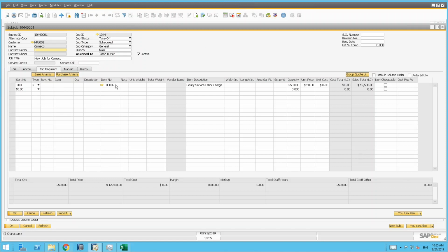And once you get this material information or the requirements information for the job, you then have the basis to set your baseline. You may have produced a quote from your estimating software, and that's fine. But if you want to do budget or quoted versus actual performance of a job, you need to get these lines into Airless. Otherwise, you really have no basis for budget versus actual comparison.